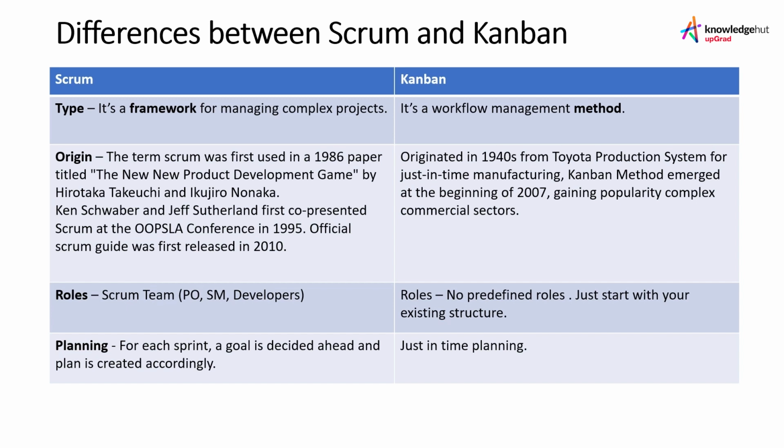And when we talk about Kanban, Kanban is a method, it does not define any roles that you have to have on your team, because it is a method of workflow management. It is not something for managing the whole project in itself. So it doesn't give you any predefined roles. It tells you that you just start with your existing structure. Whatever you have currently, you can start applying Kanban on top of that without making any changes in your organization's structure.